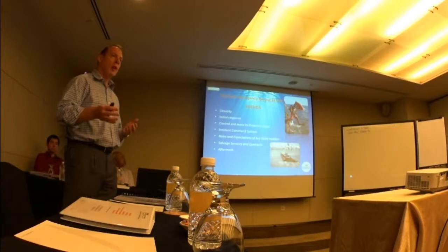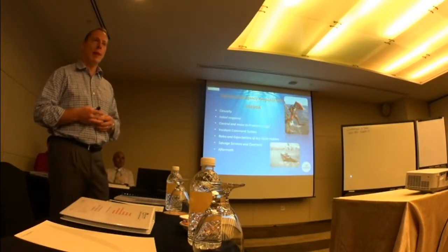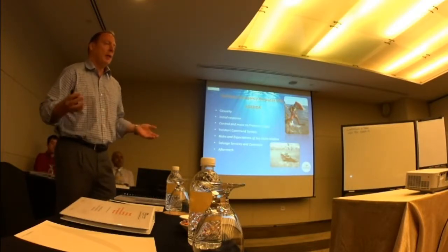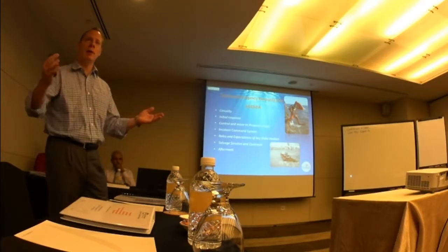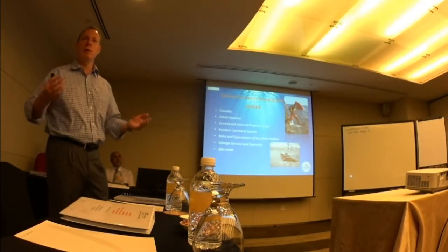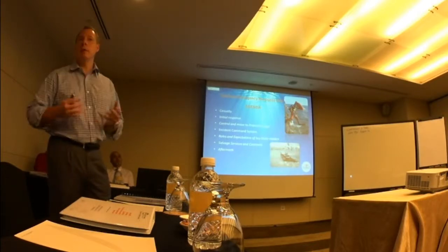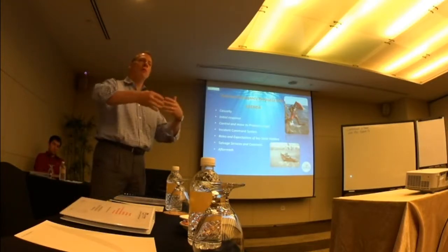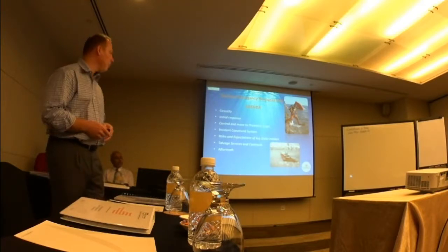So the contracts, there are a few aspects to it. I think we try to link that to the scenario that we are going to play out as well. I think there are certain areas where you can see, well, okay, this is a fairly basic, fairly defined scope of work, so why should I have a kind of contract that accommodates for everything else and so on, so that can be restricted, where maybe there are other aspects where there is not so much clarity on how a process will develop, and then different kinds of contracts might be more suitable.